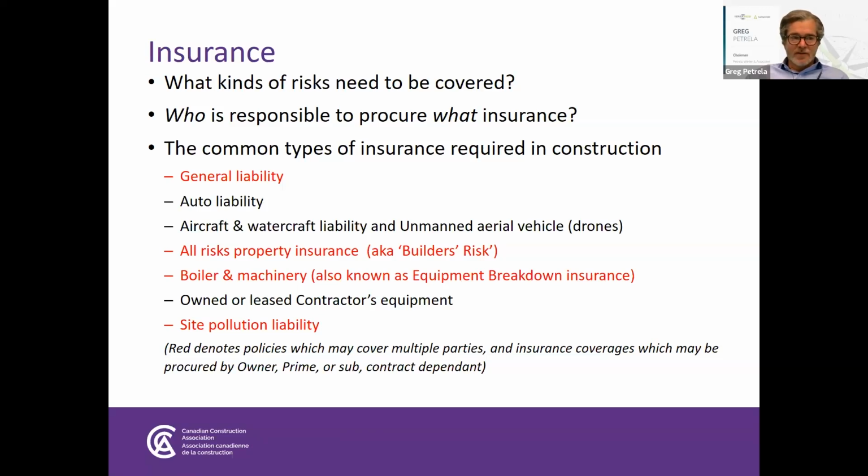Let me address that. So there is a form of insurance policy. It used to be called the comprehensive general liability policy. They decided that was too broad a sounding document, so they changed the term about 35 years ago to commercial general liability policy. And it is what almost every business enterprise would be carrying. It's a policy that covers their operations, the risks associated with visits to their premises, risks associated with their operations outside and so forth. And that is called the commercial general liability policy.